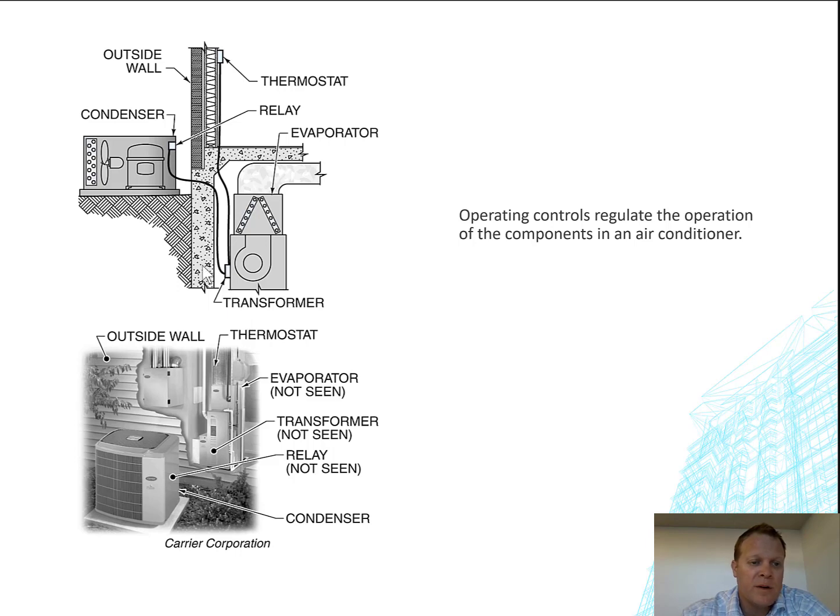And so if we're in the framing stages of a project and you're just handing the drawings over to the framer to frame, that's not his job to go contact all these people. Typically, they would never do that. If you had a really good contract, it might say that they're supposed to do that, but I've never seen a framer go contact a mechanical contractor and say, how big is your furnace? Typically it's up to the general contractor to try and make that coordination happen. Not saying that they shouldn't by contract if they're really good, but the point being, there's physical space that needs to be coordinated.